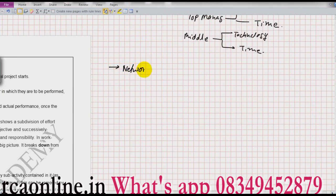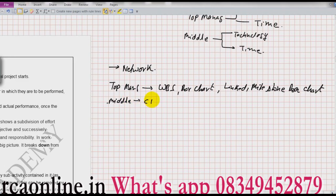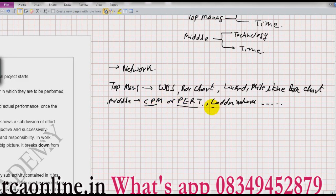To execute a project we need a mathematical model, and that mathematical model is known as a network. Since the project is different for different people, this network will also be different. For middle management, this network can be WBS — work breakdown structure — bar chart, linked or milestone bar chart. For middle management it can be CPM or PERT, which is in your course. There are other networks also, like ladder network.